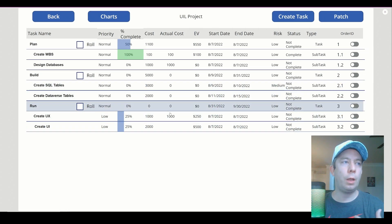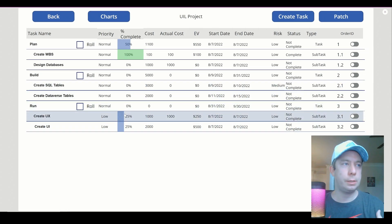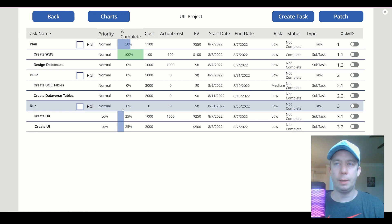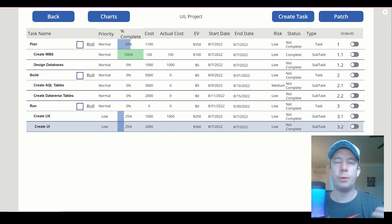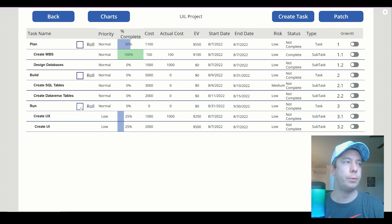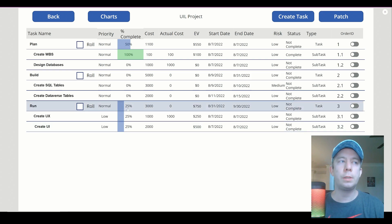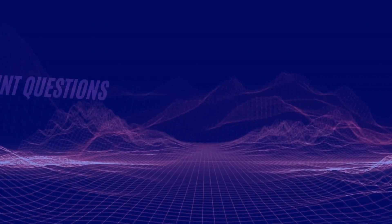When we roll up, we should have $3,000 in cost and we should have 25%, right? Because the average of two 25% should be 25%. So we'll hit the roll button, rolls up, we got 25% and $3,000.